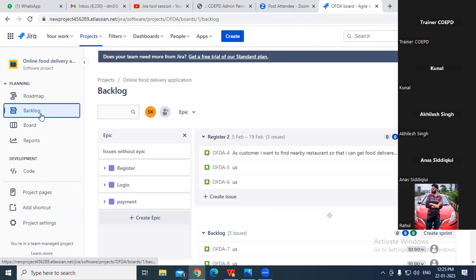Rahul, please understand, it's not the business analyst who initiates a daily stand-up meeting. It is a Scrum Master, point number one. And whenever you have a stand-up meeting, they have a Scrum board. They don't go to Jira. They don't talk about the user stories. The main agenda of a daily stand-up meeting is what you have done yesterday, what will you do today, and what you will do tomorrow.